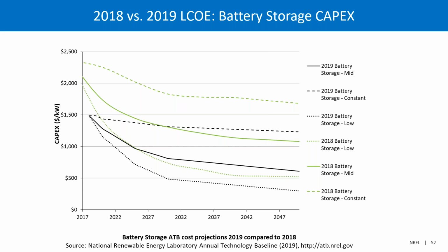In terms of, I think important for this as well as for all other technologies, the costs that we're using for the ATB are like a cost for 2020 is the online cost that represents a system coming online in that year, rather than a cost that's ordered that year or a PPA signed for that year. So when you're looking at these costs versus other things, you want to keep that in mind, and that these are meant to be all-in costs or overnight costs, but all in there.